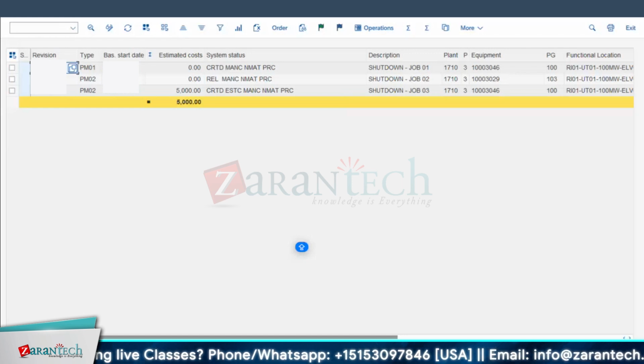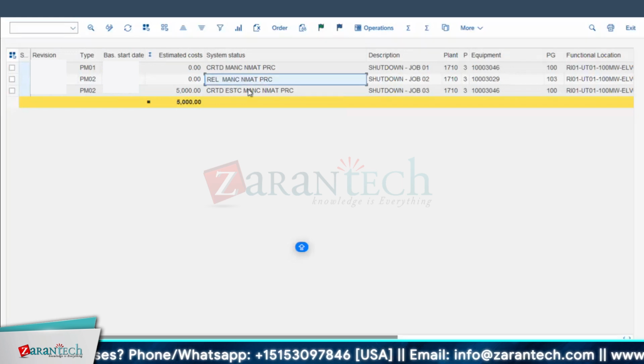So typically in Maximo you create a parent work order, and then all these work orders would be child work orders to this. Okay. And your dates fall between, so the parent work order can have a larger date gap, like a 7 day shutdown, and then the child work order dates fall within those dates. Yes. And then cost can roll up from the child order to the parent order. Exactly. But here cost doesn't roll up. No, individual order cost will be there.